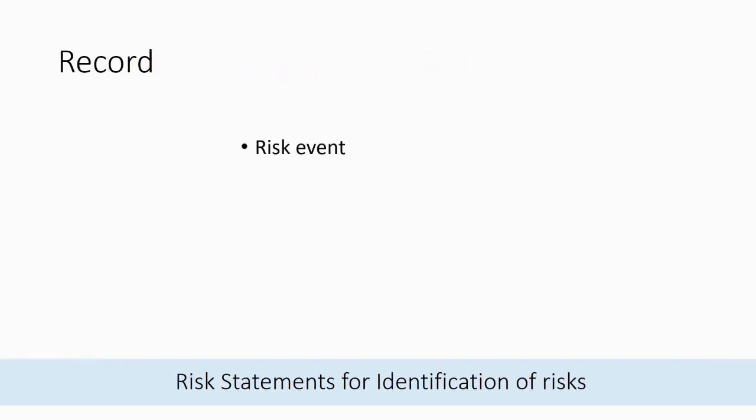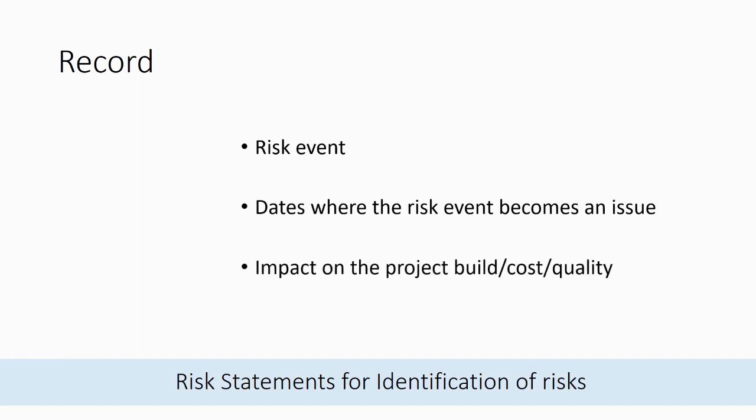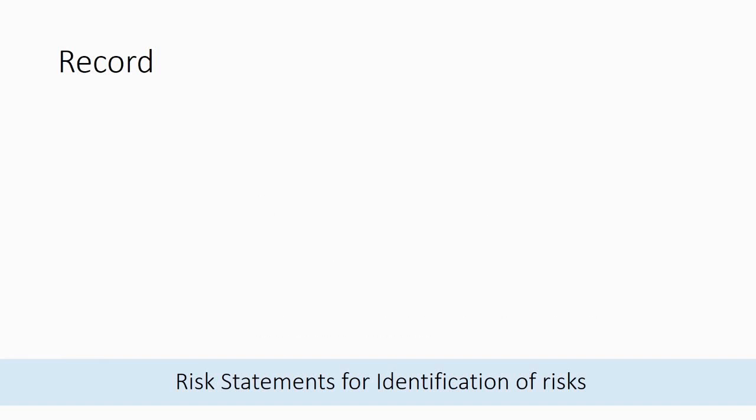Identify risk events, dates where the risk becomes an issue, the impact on the project build cost or quality, and then estimate a probability that the risk will occur. Create a table of these risks and review and monitor this table of risks at each project management meeting.